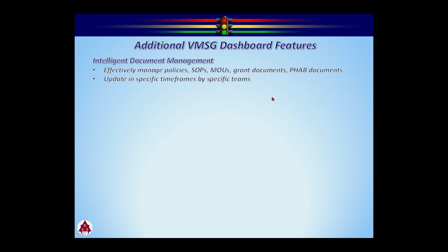There's an activity, that QA activity you saw. There's an option for that called a timeline. What you do is say, we're going to set the beginning date to the beginning of the fiscal year. We're going to set it to an annual cycle. We're going to say when this light turns yellow, let's say 80% of the way through the year, Fred is going to get notified to go in. He's going to download that document, do the updates, upload the new version. All the lights turn green again, and it gets all managed through. So it really is, by the way, the most popular tool that we've put in there since we added it. People just love having all that available to them here.